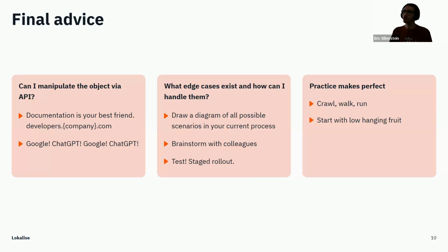Absolutely. What I would suggest doing, the easiest fix, is within your Jira board, you have a different step for DTP, where after content's uploaded, it moves to DTP. And that can be done without even using make.com, and only after you go from the DTP column to the next step, which includes uploading to Localize, then you kick off your workflow builder.